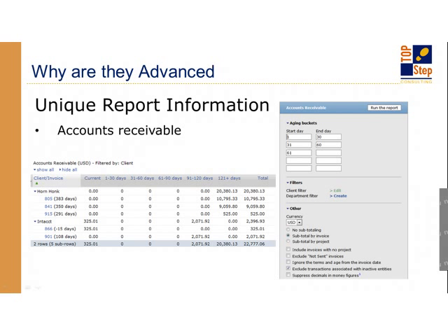And as soon as you enter in the payments, the amounts will update. If they pay in full, it'll disappear from the report, but if you do a partial payment, it will update according to the payment amount and what's outstanding. If you update the invoice amount or the invoice date, that will then move these values within your aging buckets. So if you submitted an invoice and then they came back and said, can you resubmit this, make this change, when you provide the updated date, it will move it into either a current column or move it up a bit.